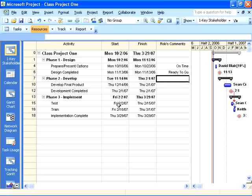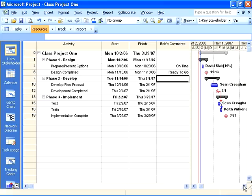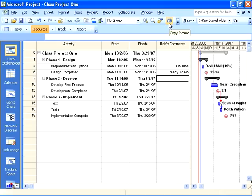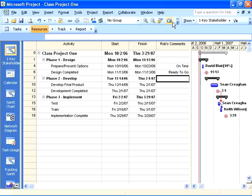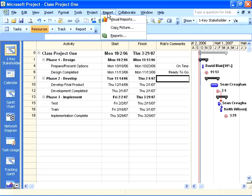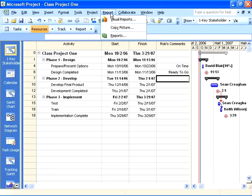There's a nice feature in Microsoft Project called the copy picture feature, and this allows you to quickly and easily get information from Project into another application like PowerPoint or Word. There's two ways to get at this function. There's a button here that looks like a little camera called copy picture. If you don't have that showing, you might have to go to the end of your toolbar, look at the drop-down list and find it. If you don't want to access it via the toolbar, you can also access it under this report menu item, which is a new menu item to Microsoft Project 2007. If you're using 2003 or earlier versions, the copy picture will be there but it'll only be available through the button bar.